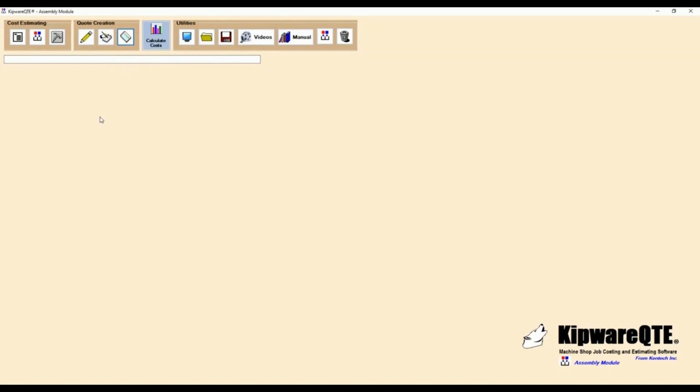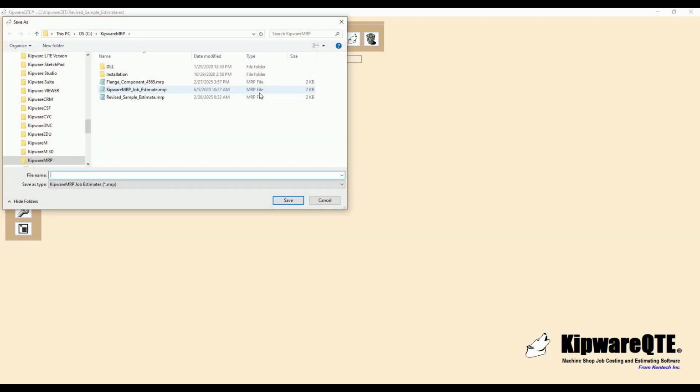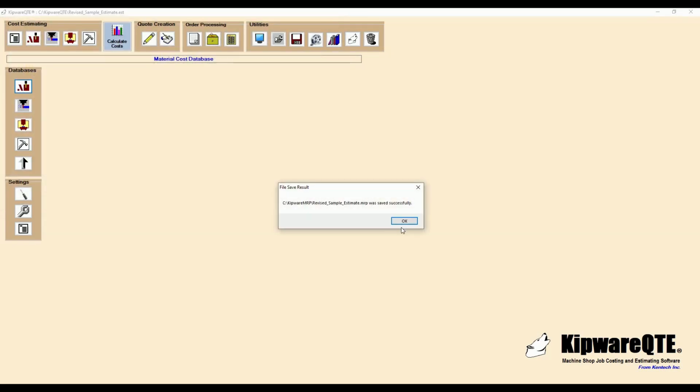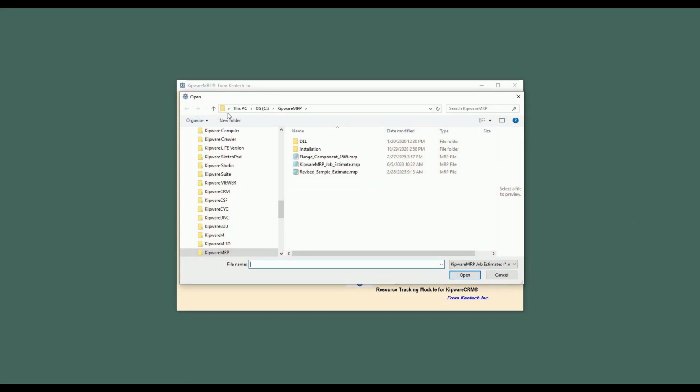Starting in Kipware QTE, we have created a cost estimate. Previous videos go in depth in that process. For the sake of this video, we will proceed with an already created estimate. After the work is awarded, we can recall the previously created estimate in Kipware QTE and select to save it as a KipwareMRP job estimate. Opening that job estimate in MRP, we can review all the inputs and costs that were in the QTE estimate.